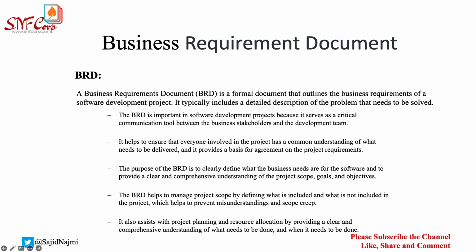Now there's another term, gold plating. Gold plating is nothing but the same thing coming from the development team. You or a BA, your development team is trying to give something more so that business will be really happy. However, that is not the actual ask from the business, and you're still going to go ahead and add, considering this will not impact your quality, timeline, cost, and everything. Even though this will not impact, this will be considered gold plating, that you're trying to please and make someone happy. This is a big no in the software industry, so you should not do this.